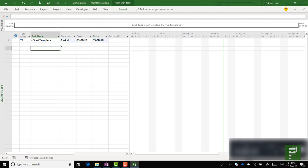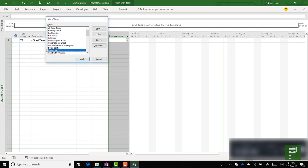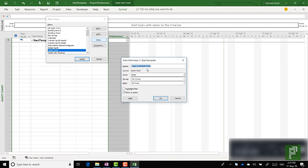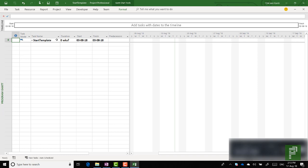Other than that you would like to have a specific view readily available in your start template. So let's create a new view with those two custom fields. We're going to go to View, then More Views, and create a copy of the standard Gantt chart. Let's call this Program Gantt chart. We'll keep it at entry, groups, filters — show it in the menu, yes of course. Let's head on over to Apply. Right from the start we'll see that it is the Program Gantt that we're seeing now.